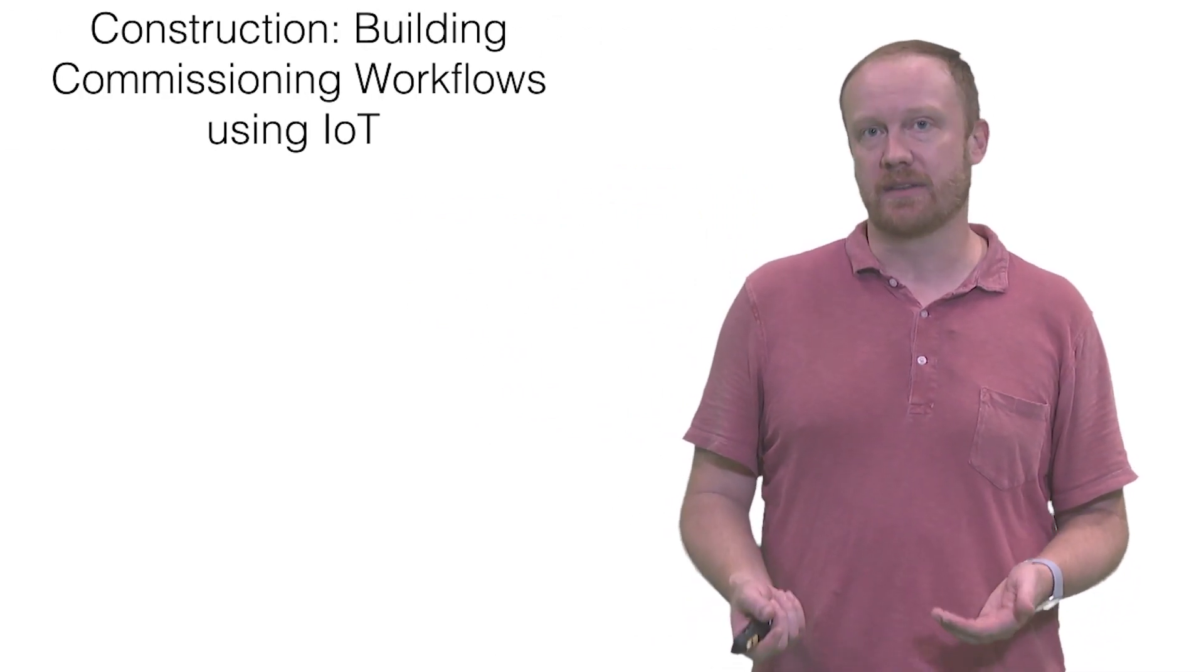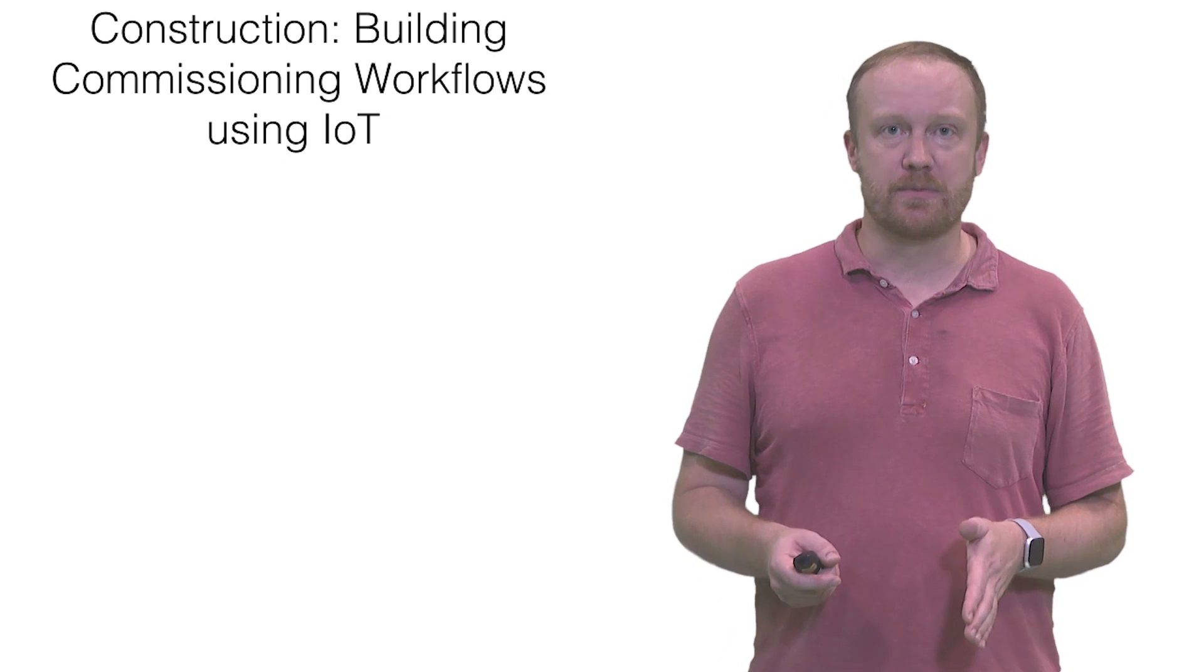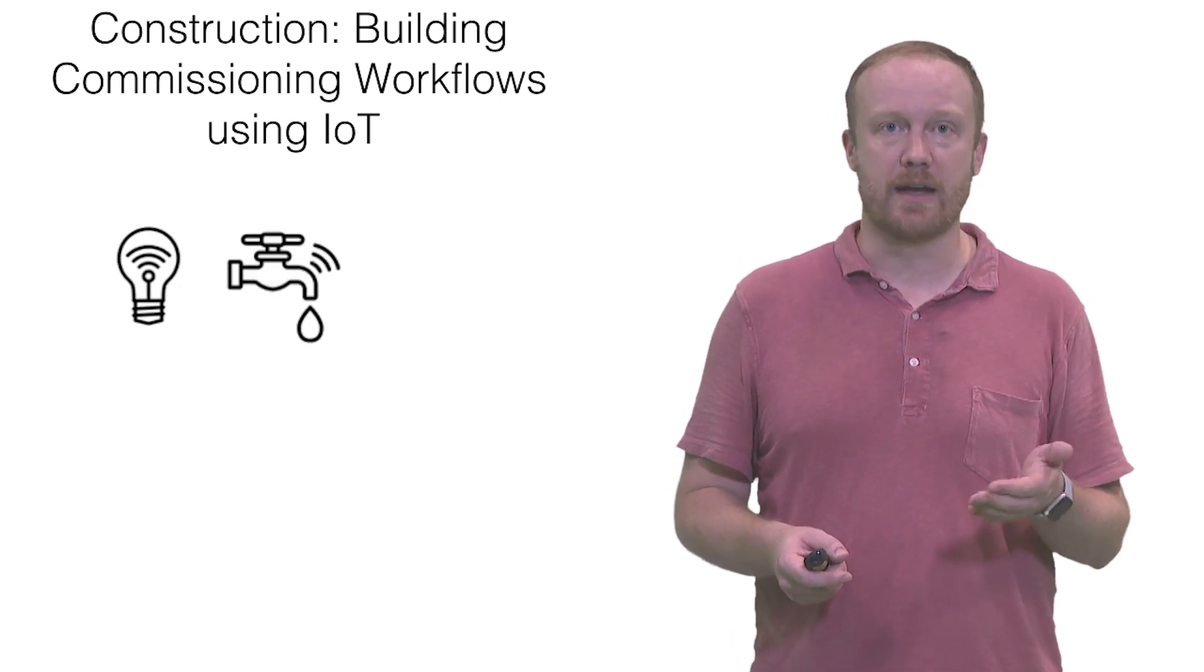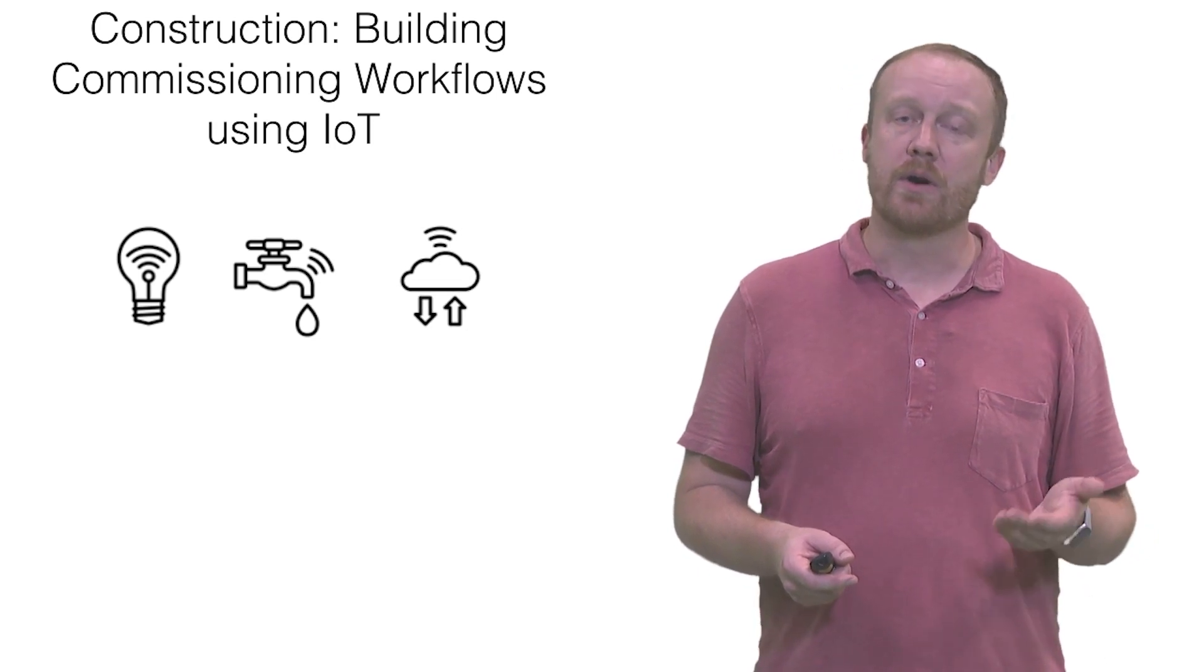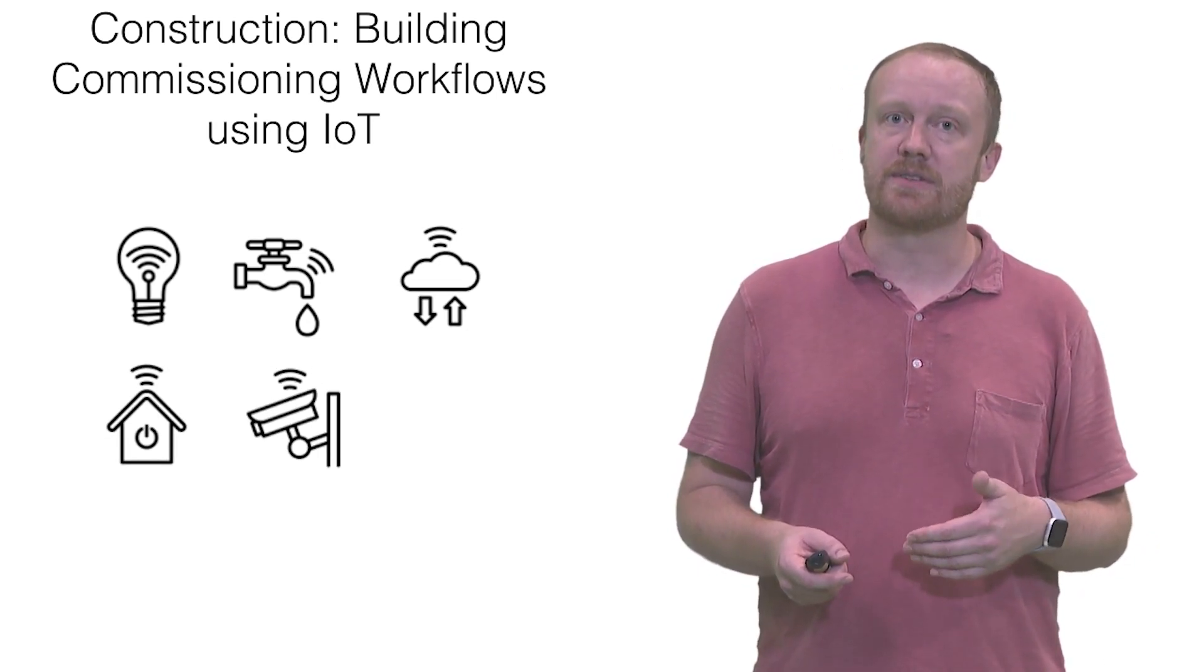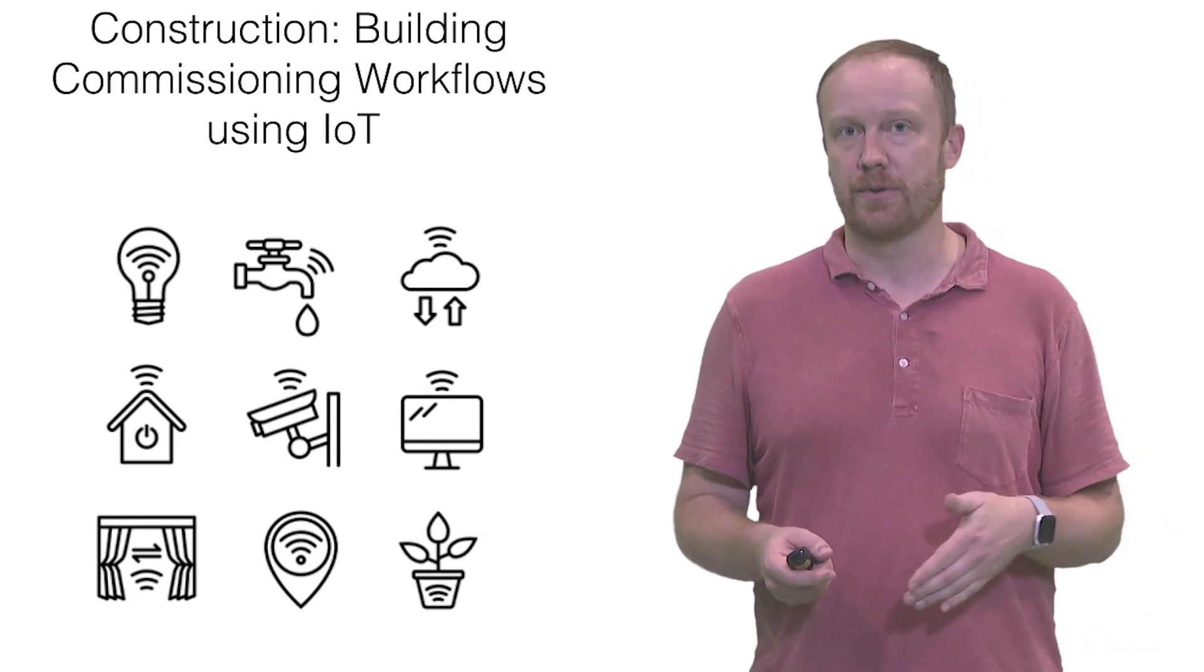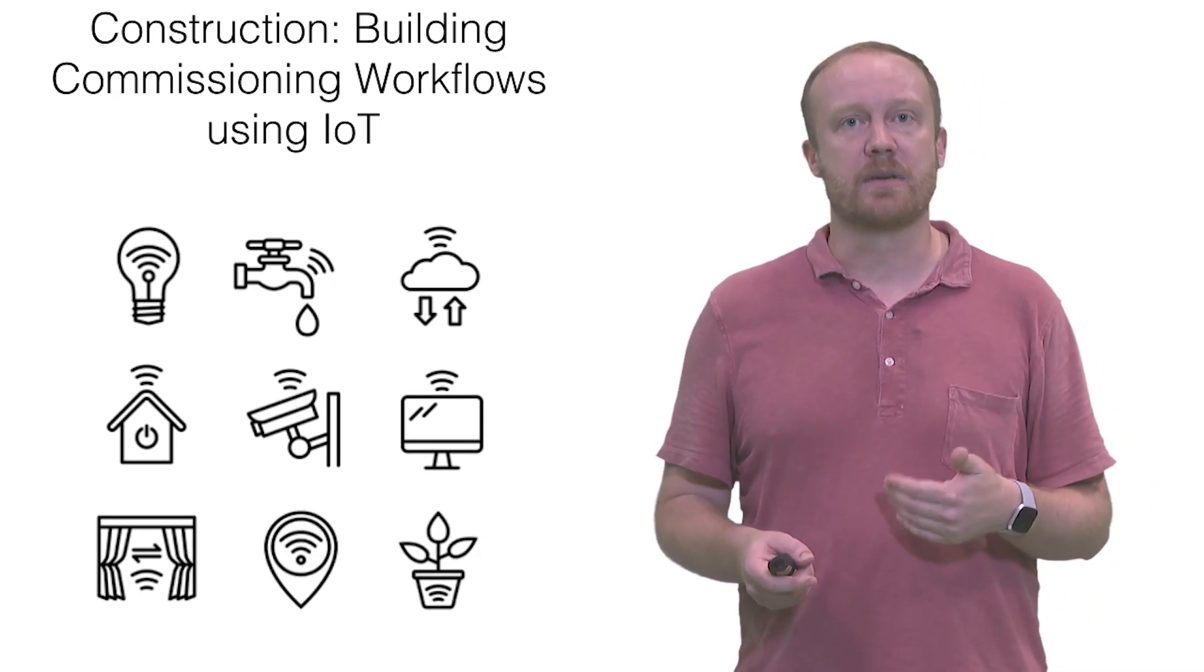The second dataset that we'll use is from the construction phase of the building lifecycle. In modern commercial buildings, there are sensor networks installed in a building that control systems such as lighting and air conditioning. One of the goals of the construction process is to confirm that these systems are working well before being handed over to the owner. This process is called commissioning.